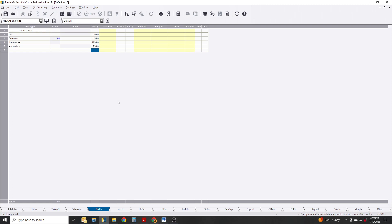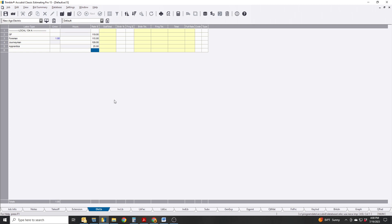Like I said, if you do this as a default, you can always come back in here - make sure everybody's out of the default folder first and foremost - and then when that time comes around, you change all your rates. Like us in Chicagoland, we're 134, but we have surrounding areas we might work in like 701, 176, and they all have different rates - hourly rate might be lower or higher, fringes might be lower or higher. You got to do different things, especially if you're traveling - you want to make sure there's stuff buried in there for a service truck, whatever the case may be.